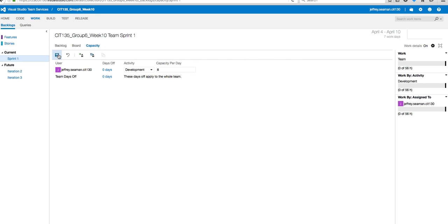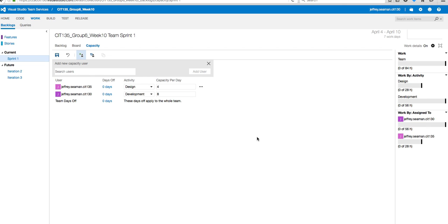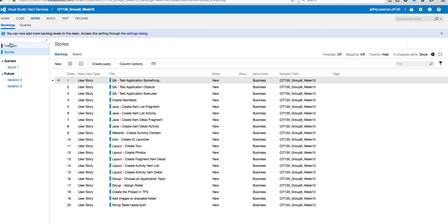All right, so I'll hit save. And then you also put team days off. If there's other people, you put the days that they're off as well. So let's add another person, because we're going to add the other Jeffrey Seaman. Add user. We're going to say he is design, and he's only going to have 4 hours. You see the time now says 28 hours, so he only has less time. Now we're going to go back to the backlog, or the Sprint 1 stories.